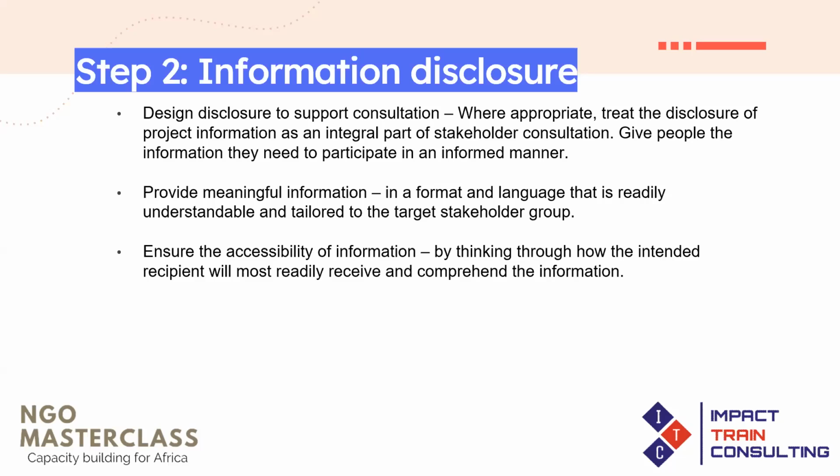So it's always important that when you're sharing information with people, you share it in the format and language that is readily understandable and tailored to them. It's not everybody that you will be communicating with in English. Sometimes you may need to communicate in local languages, so you may want to translate the information into the language. Some people you may need to speak with in Pidgin English, so you may want to translate that into Pidgin English.